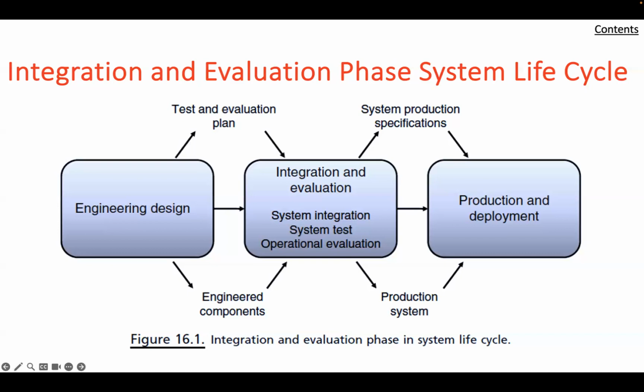The engineering design phase is focused on the design and testing of the individual system components and is typically carried out by a number of different engineering organizations, with systems engineering and program management oversight being exercised by the system developer. On the other hand, the integration phase is concerned with assembling and integrating these engineered components into a complete